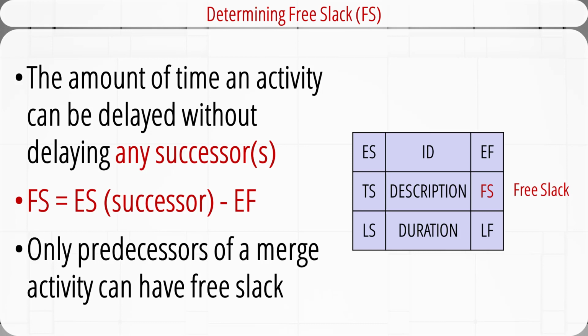Mathematically, the free slack of an activity is the difference between the early start of its successor and its own early finish. Only predecessors of a merge activity can have free slack. Other activities will not have any free slack.